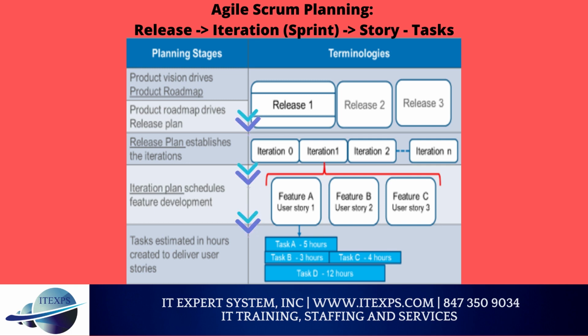During sprint planning, we select stories for a sprint. Stories are broken into tasks, which are measured in hours. Team progress is measured with team velocity and displayed as burn up or burn down charts. Team velocity means the average number of story points completed in one sprint by the whole team.